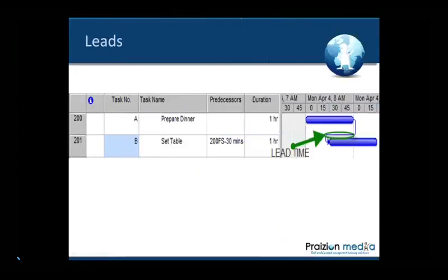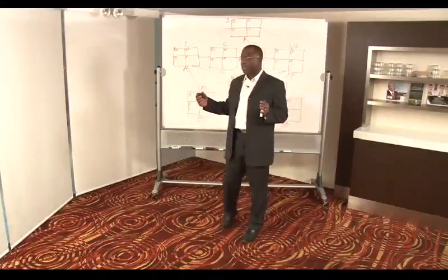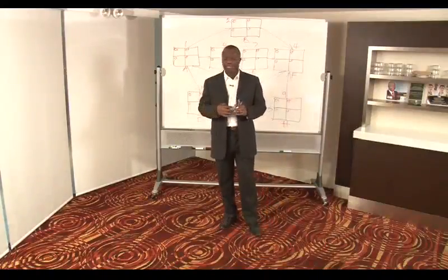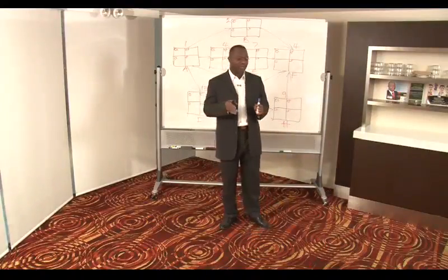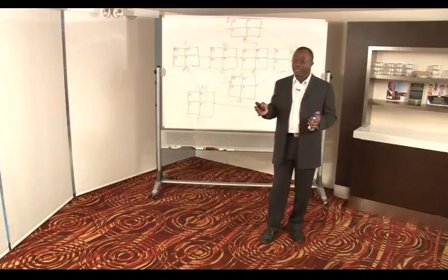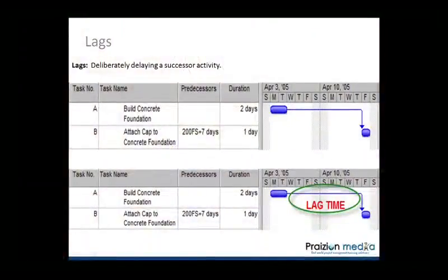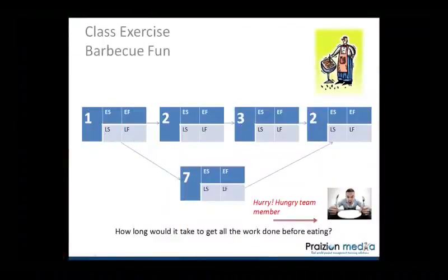How about lag time? In the case of lag time, you can see build foundation and attach cap to concrete foundation. You can see some lag time is in there. Lag time is due to the fact that you need to allow concrete to cure. It's not necessarily an activity in itself, the 7 days or whatever the duration is for the curing of concrete. It's based on nature, what is. So lag time, lead time, understand the differences.